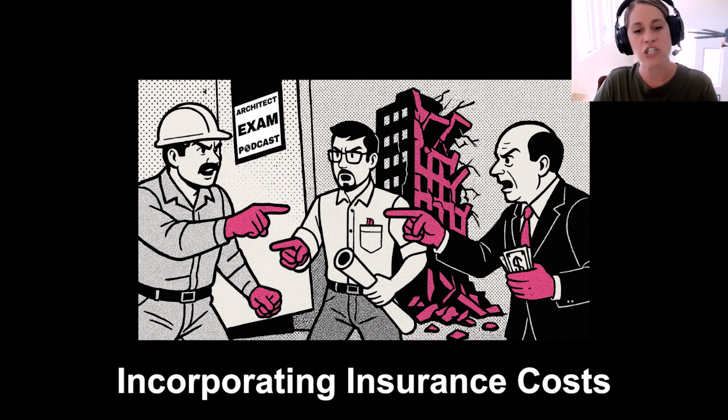There's also business insurance versus project insurance. This is another concept that shows up on the exam. There are the insurance policies that are covering you as a running business on the day-to-day, whether you have an active project or not. You will need to carry professional liability and errors and omissions insurance, but you may also opt to get additional custom add-on policies based on project type, whether there's high risk based on location or building type or scale. You may get project-specific policies just for one job in addition to your existing policies.